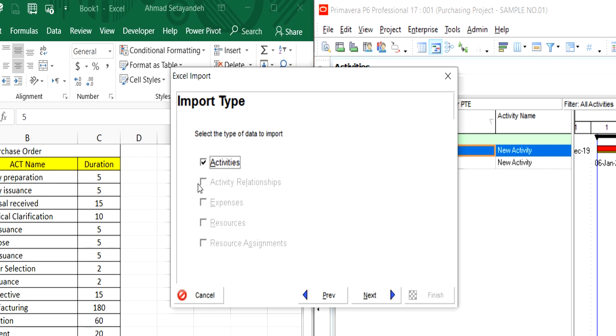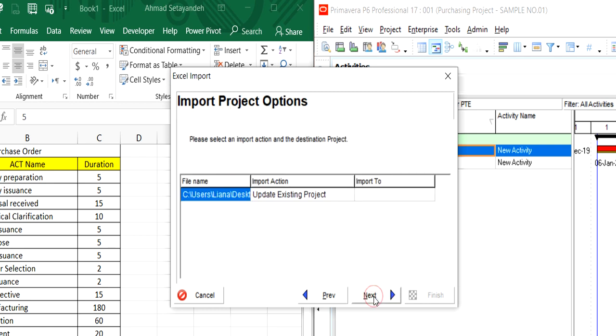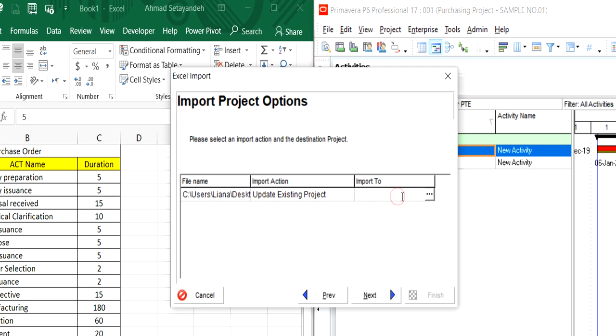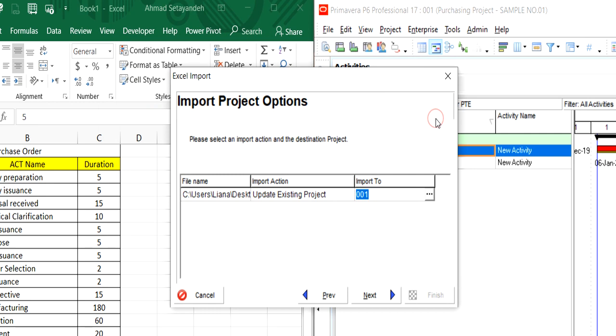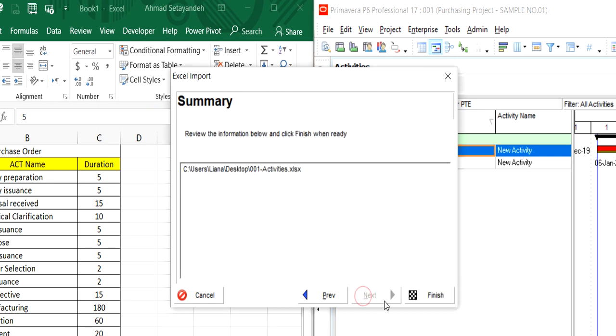P6 only lets us import activities. We don't have any information in this file subject to activity relationships, so the activity checkmark is on. Update this project: yes. Import to: you should select your project, and finish.